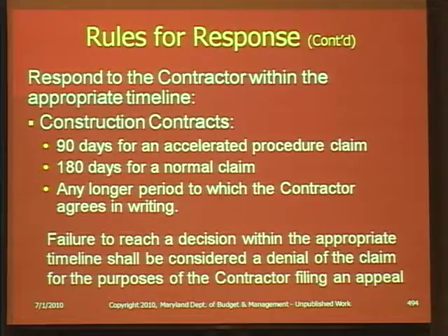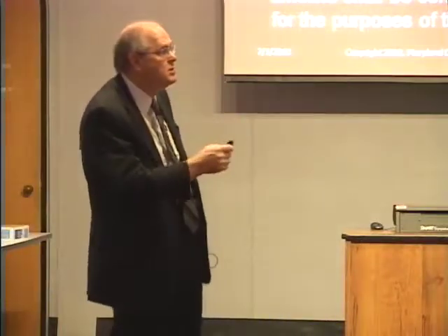And if the contractor agrees in writing to something beyond these two time frames, depending on which is appropriate, then you can do it within the time frame that the vendor has agreed in writing that you can respond. So this is your obligation to get back to the contractor to tell them, yes, you agree with the claim, or you partially agree, or you reject it and deny it, whatever the situation is.